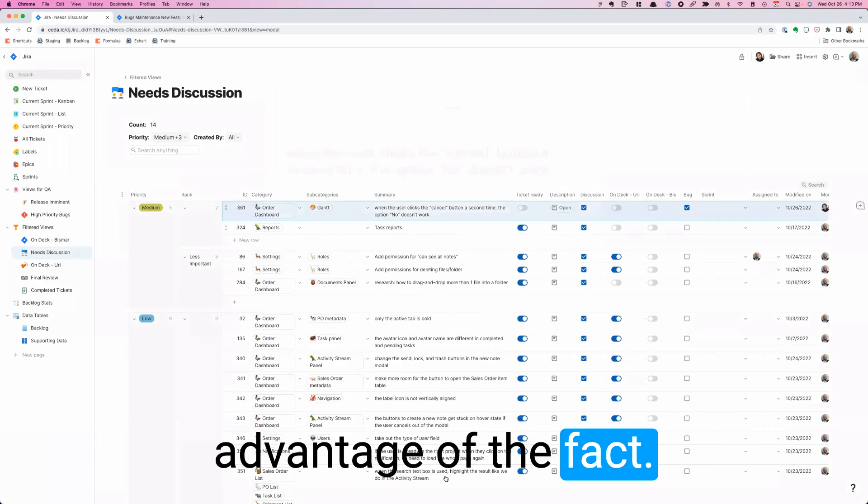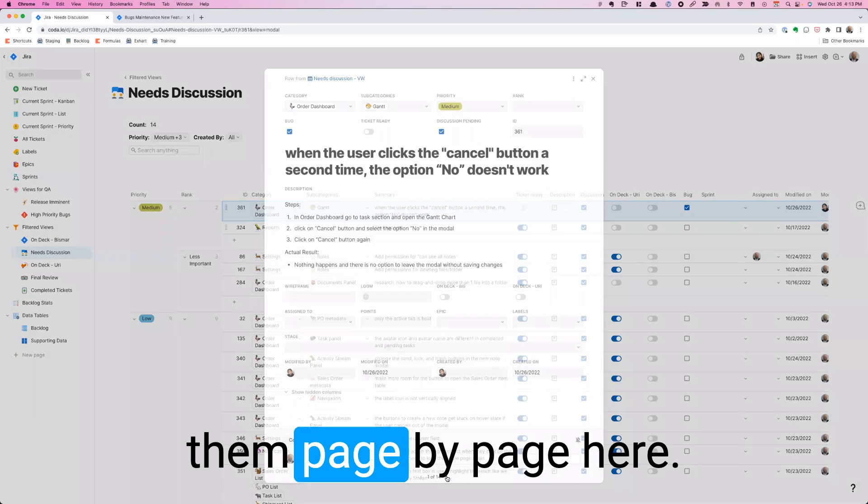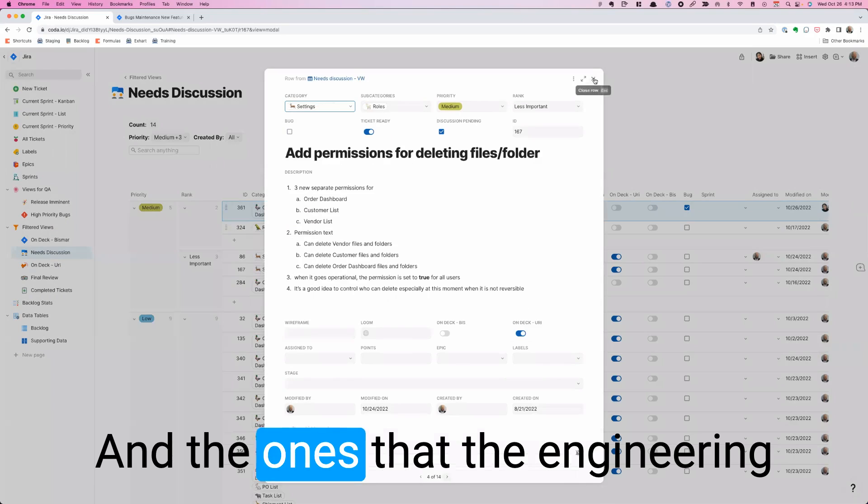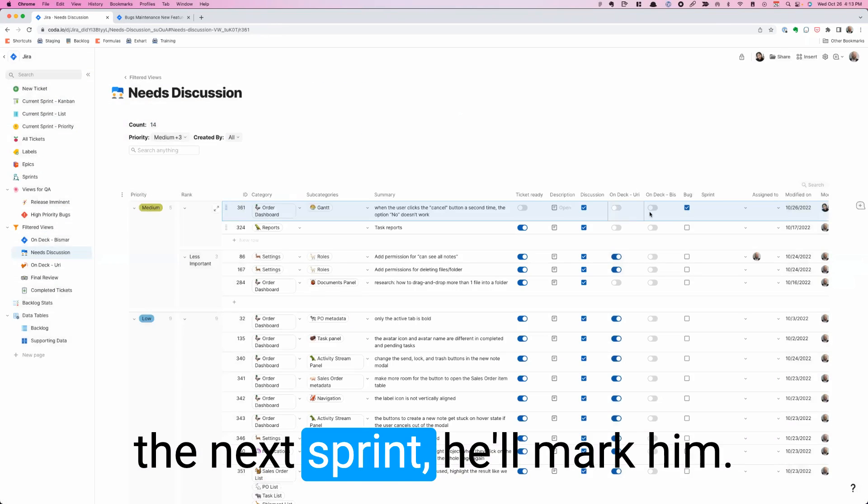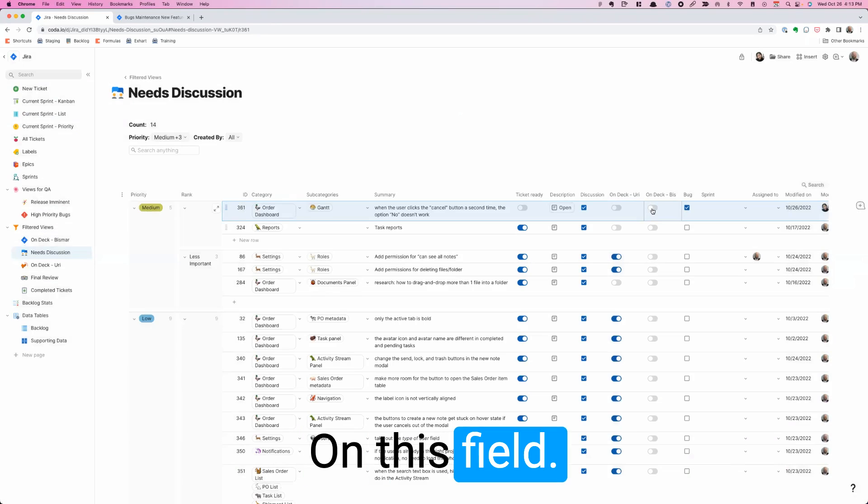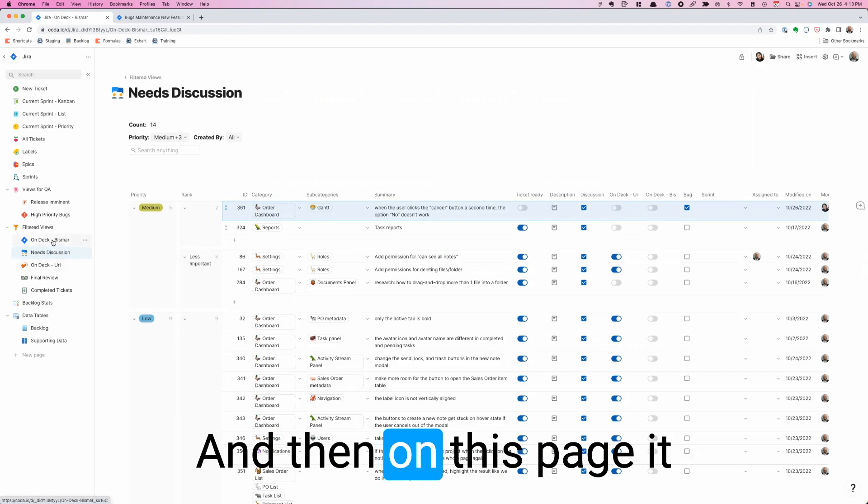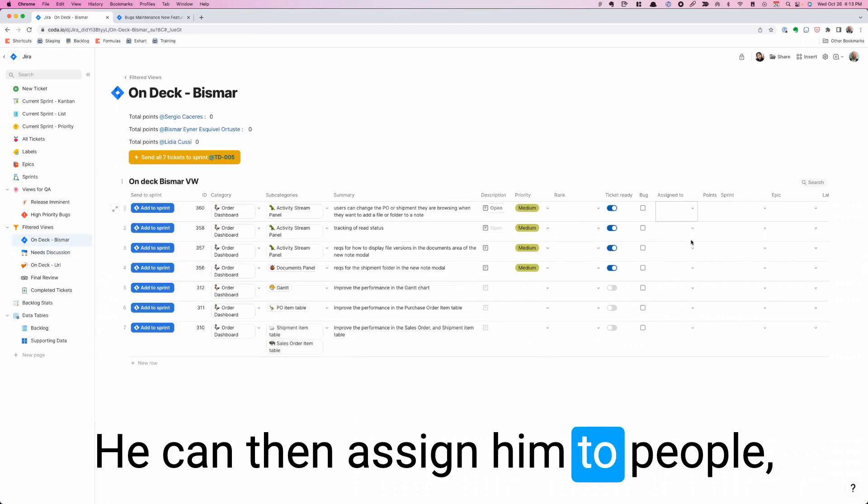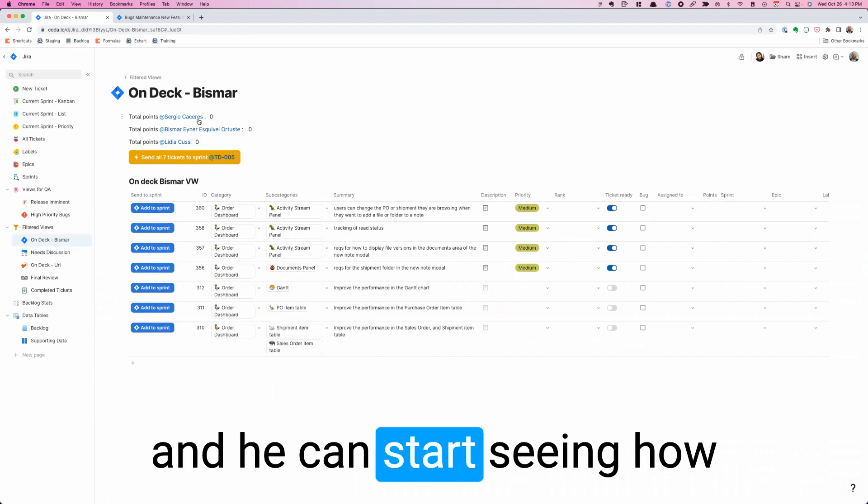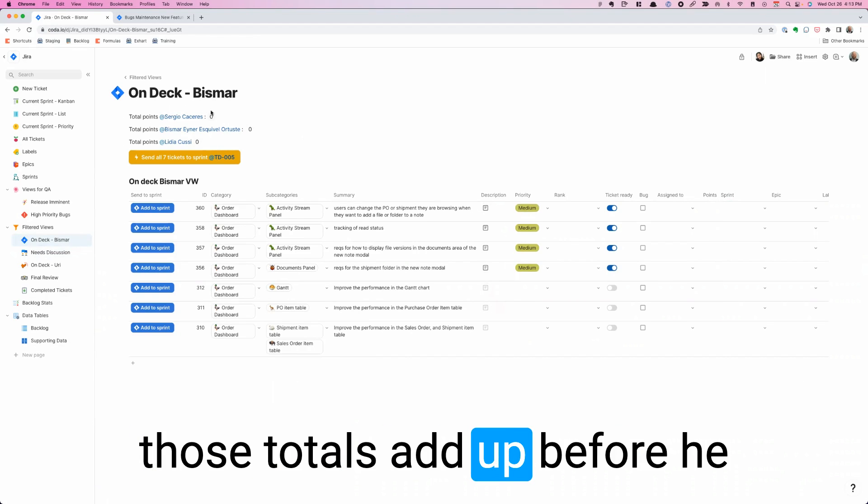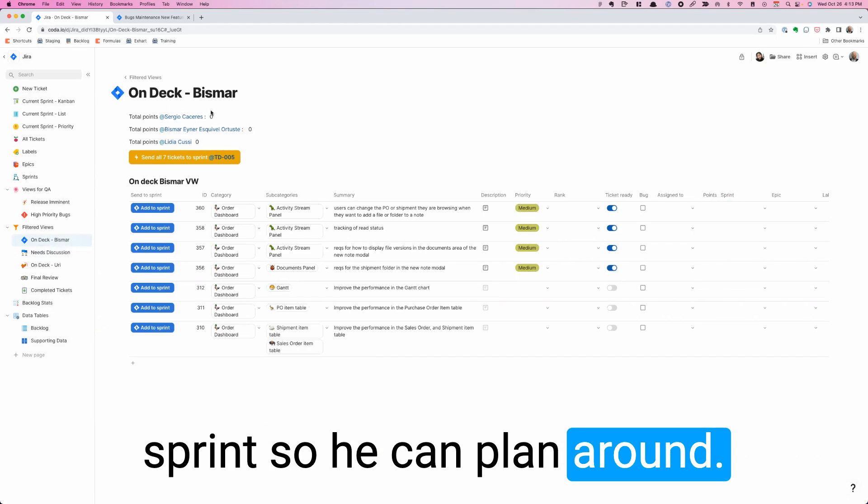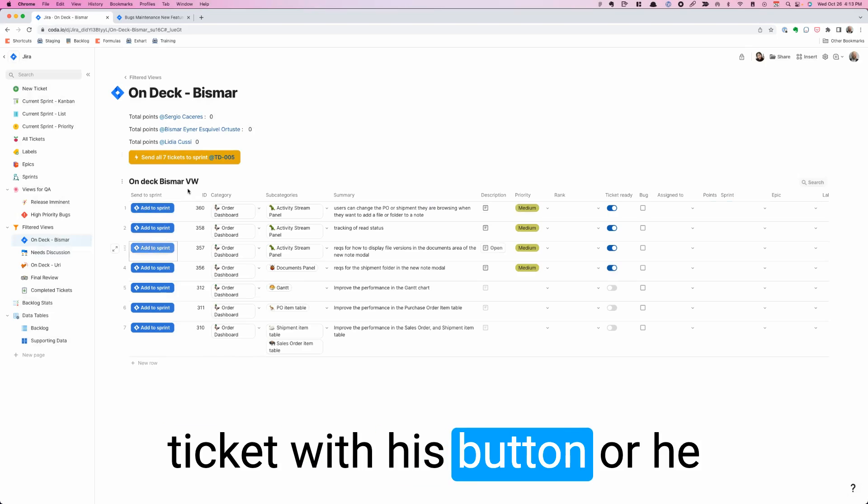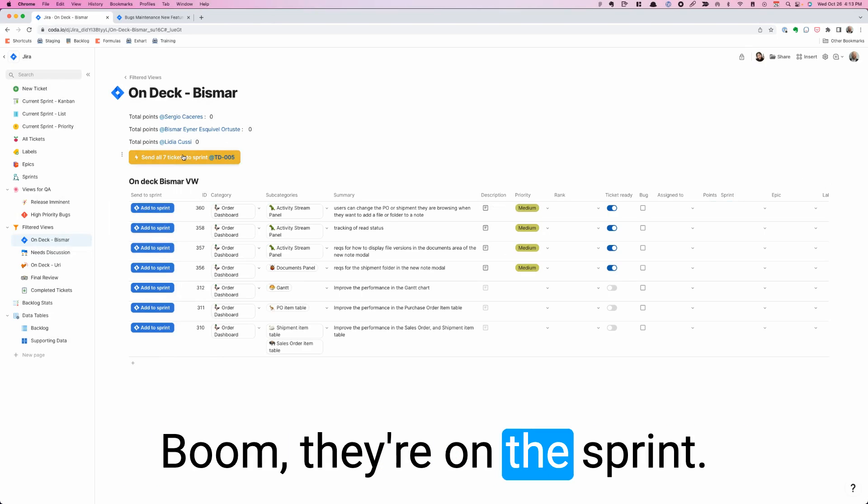We take advantage of the fact that you don't need to close them and open them. You can just forward through them page by page here. The ones that the engineering lead is considering putting into the next sprint, he'll mark yes on this field. His name is Bismarh and I'm Yuri over here. And then on this page it gets super interesting. He can then assign them to people, put points on the different tickets, and he can start seeing how those totals add up before he makes them officially part of the sprint. So he can plan around that. He can send any one ticket with this button or he can send all of them in one hit. Boom, they're all on the sprint.